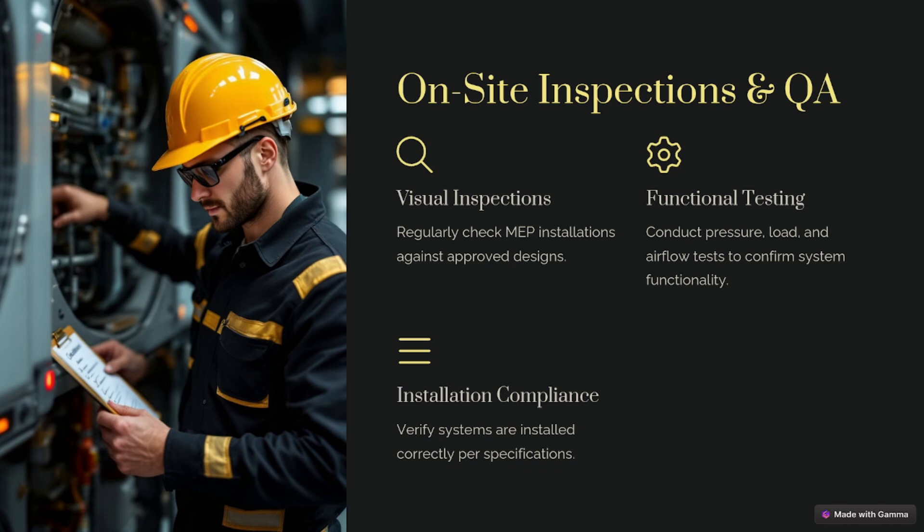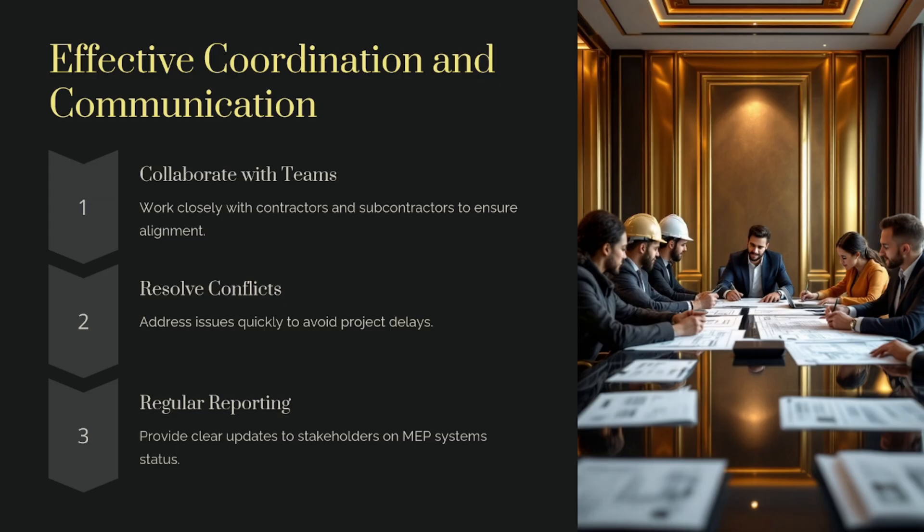The next one is installation compliance — verifying that the systems are installed correctly. As I told you, once installation is done you need to ensure everything is done correctly and follows the approved drawings, then you can go for the consultant inspection and client inspection for further approval.